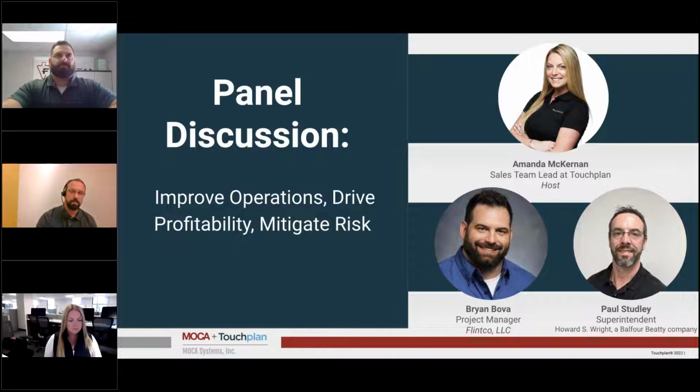Our weekly look ahead meeting, using touch plan in conjunction with a virtual meeting space, our meetings would be 1 hour for 11 floors, 280,000 plus square feet. We could get planned through on a weekly basis, efficiently and effectively. That's capturing constraints, risks, right? Logging risks, all those things within 1 hour. How do we do that?